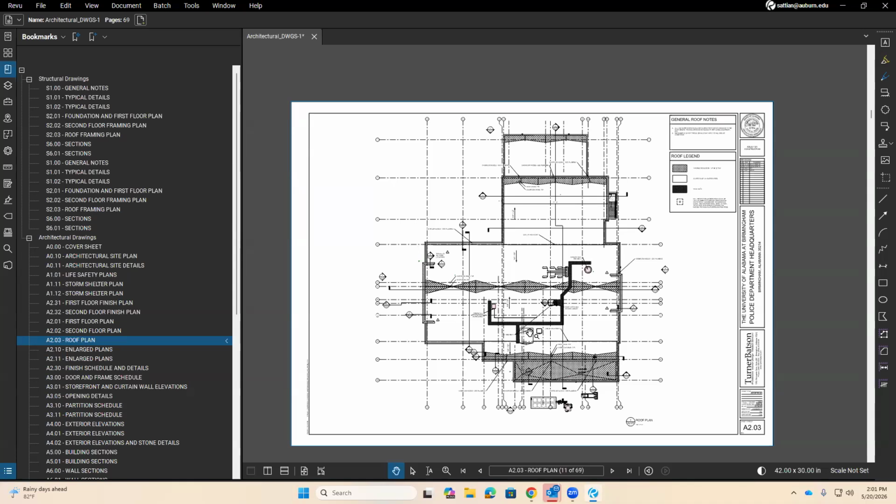First, we already established two things. Every drawing has a number and every drawing has a title, right? If you zoom into here, notice it says sheet title and then the sheet number. If it starts with the A, what do you think that drawing is? If it starts with the S, E, and so on, right? M for mechanical, P for plumbing, and so on, right?